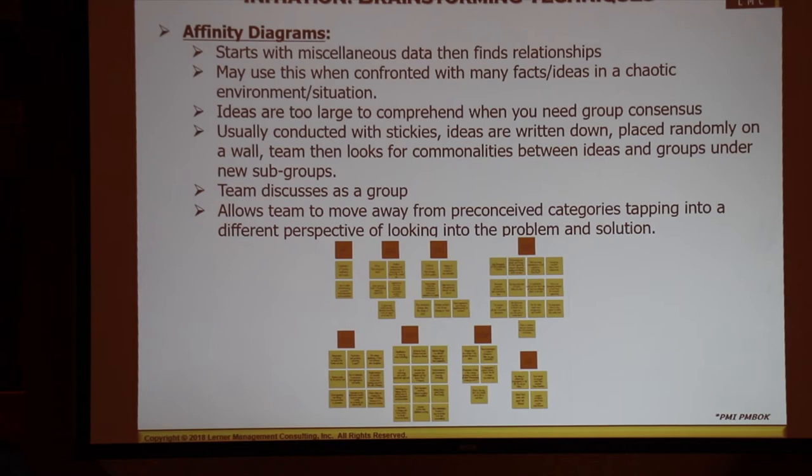Okay? So the converse here is before you had a nucleus idea, and you were revolving around that center idea. Here, I like the last bullet point here, it allows a team to move away from preconceived notions or categories, right? Tapping into a different perspective, looking at the problem and solution. So if we were to hand out all the stickies, everyone would just randomly throw this on the wall. Then we would evaluate all of the responses and look for commonalities to then rope them, the orange stickies here, into certain subsections. And that's one way to get your project started. So two techniques there.